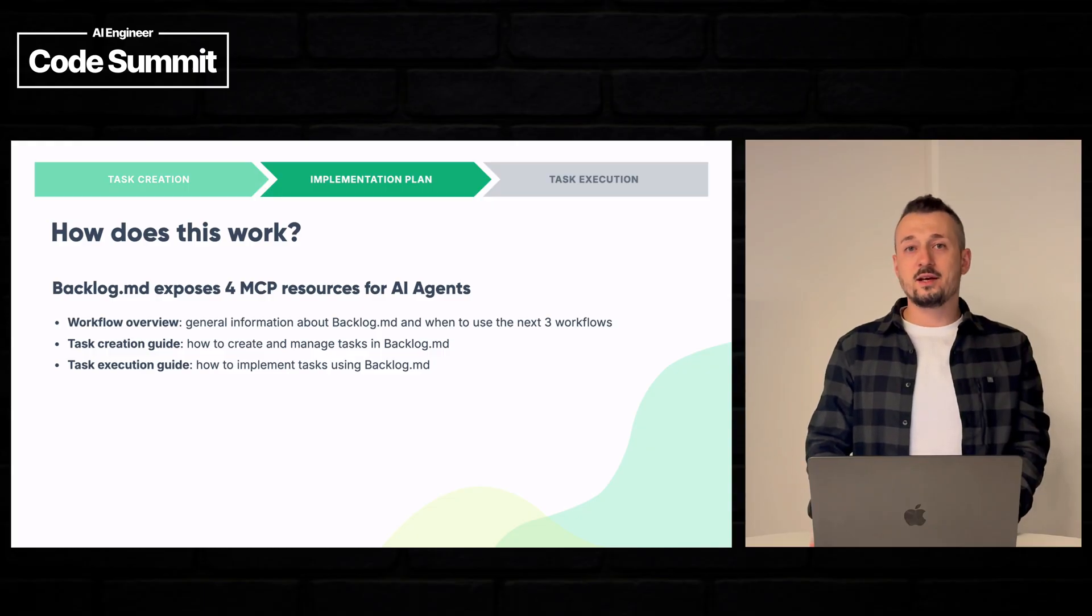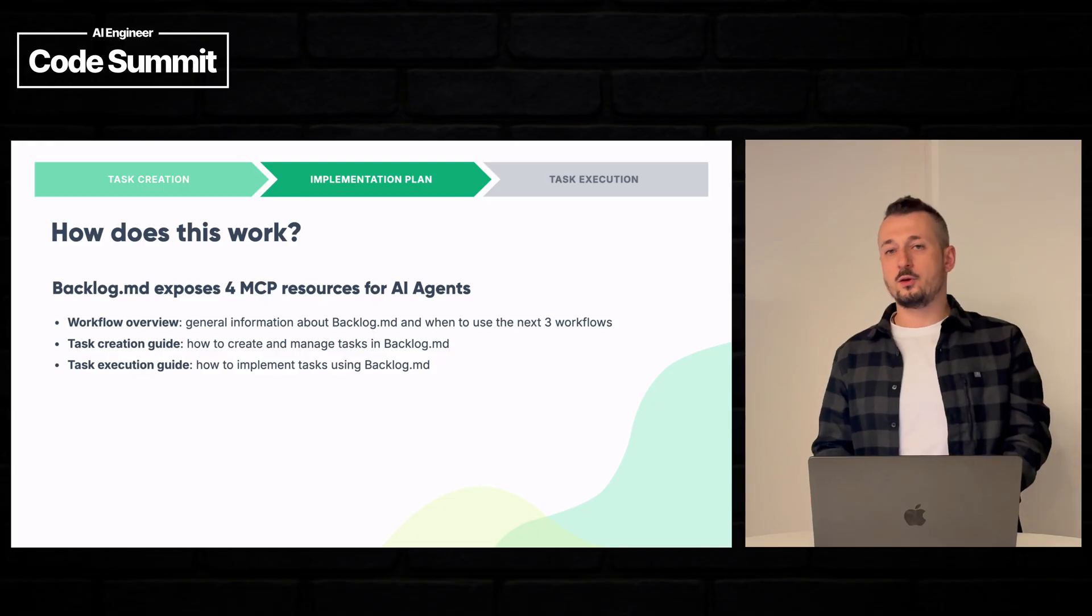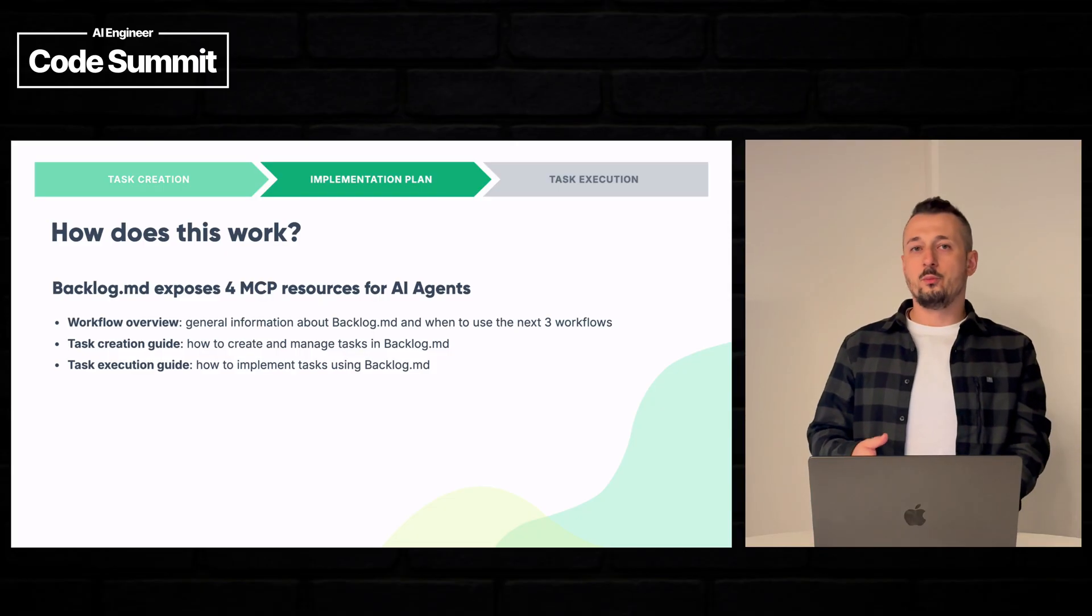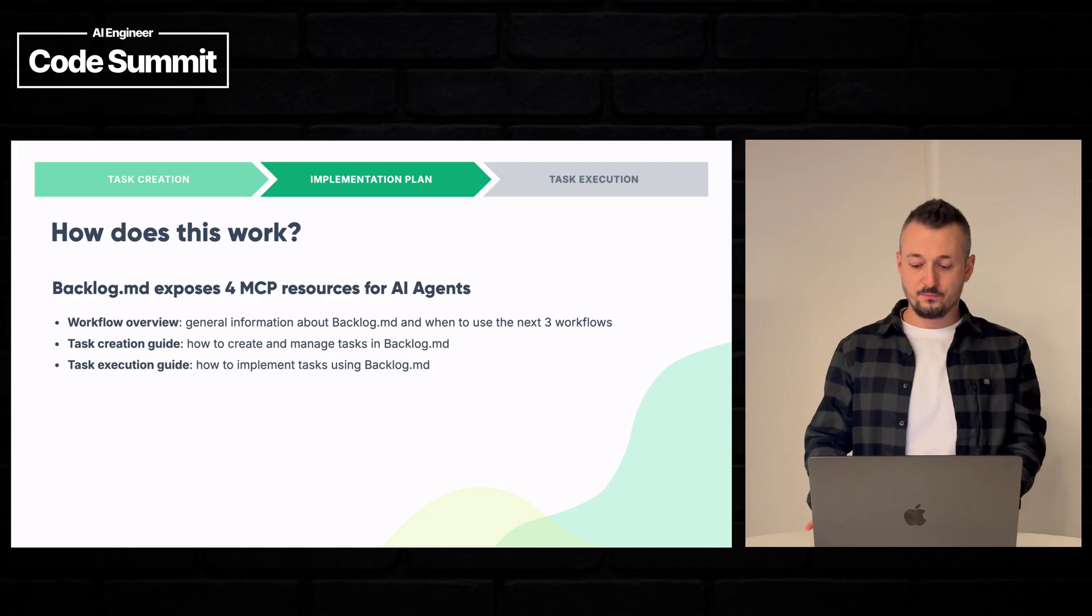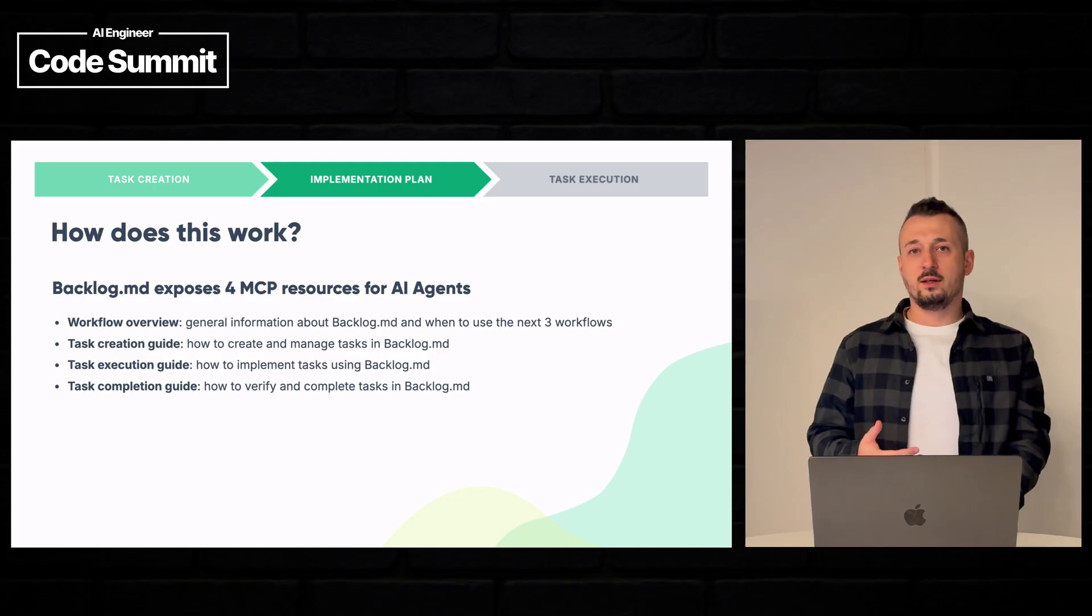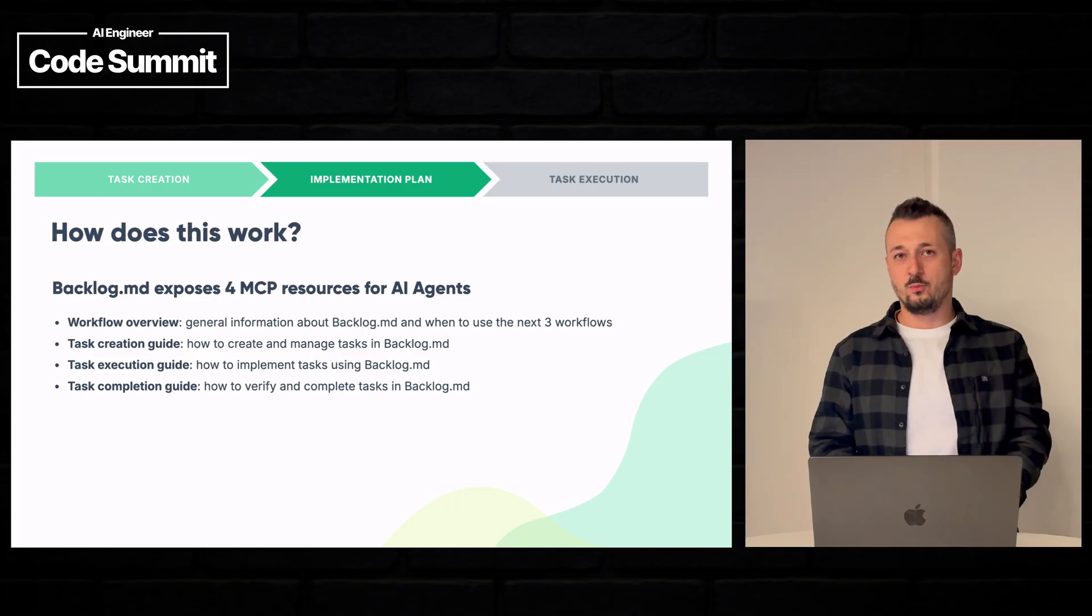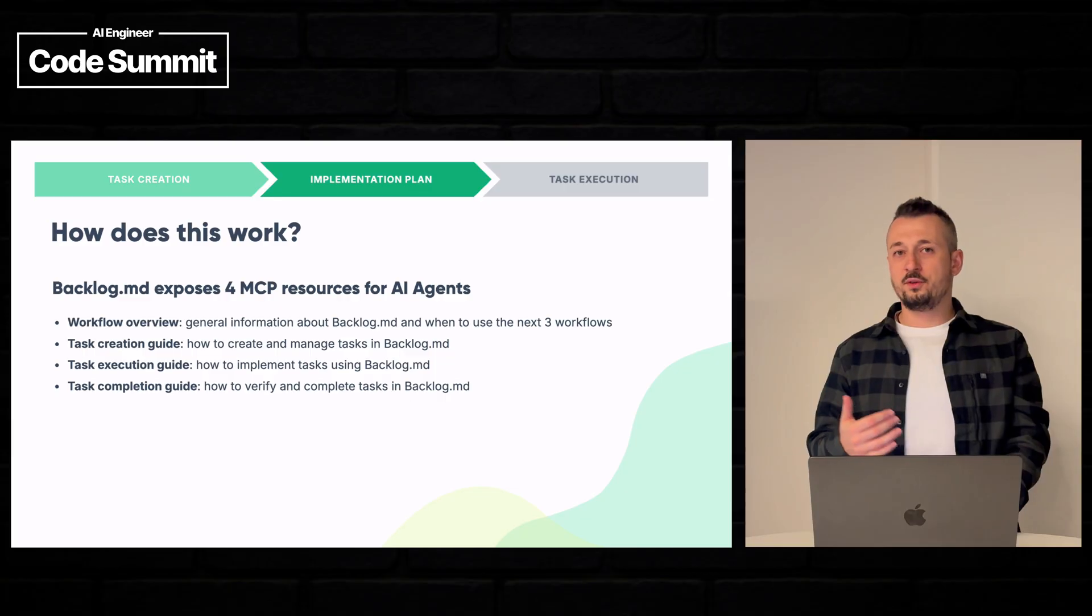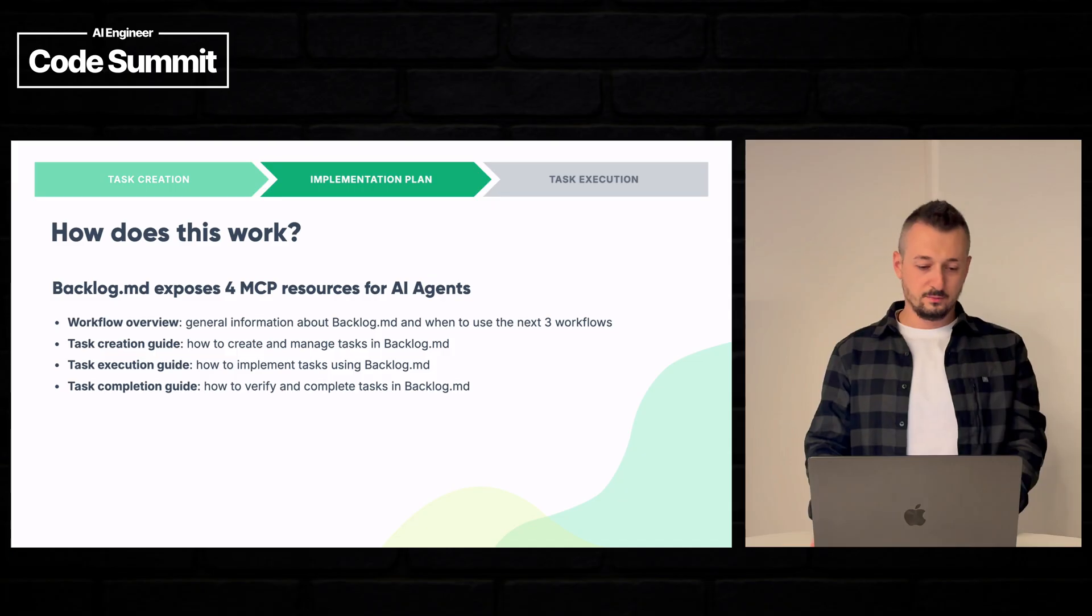The task execution guide, when an AI agent wants to implement the task, what should be done at this point, such as putting the task into in progress status and assigning the tasks to themselves. And the last guide is about completing a task and checking the acceptance criteria, if they are all actually implemented correctly and checking all of the other requirements for the definition of done that we specified.